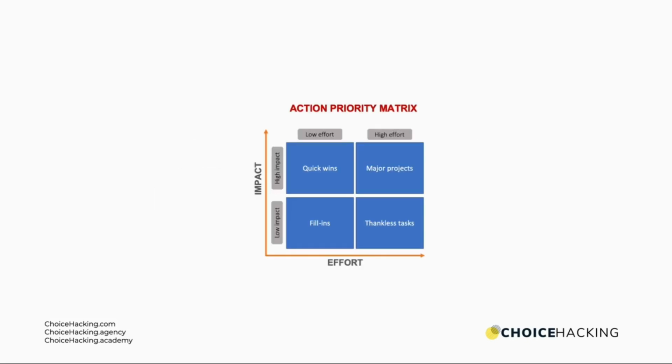Another thing that I like to do is putting together a priority matrix, something like this, where you have a 2x2 with impact versus effort, plotting what different fixes might take in terms of effort and cost, and then what they might give back to you in terms of impact. We think this is going to make a huge difference and cost no money. Well, that's a quick win, right? We can do that easily. We can do it tomorrow. It costs nothing and it gives us a big win. Okay, immediately we have to do that.